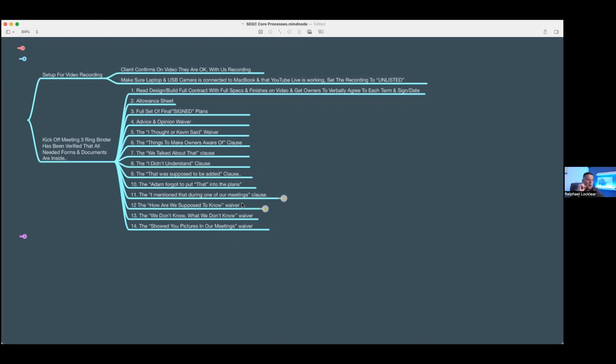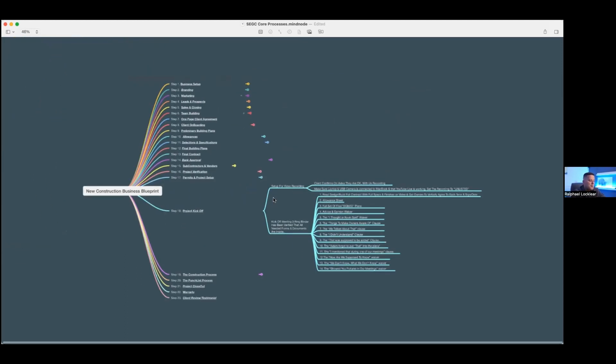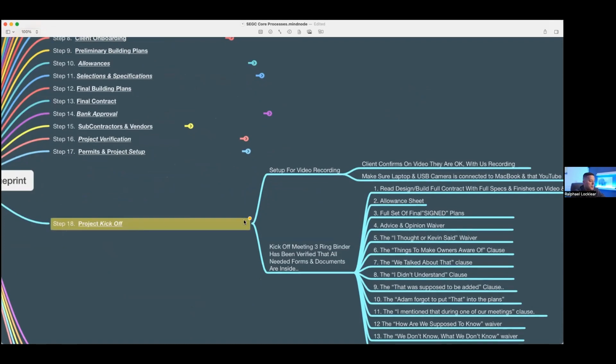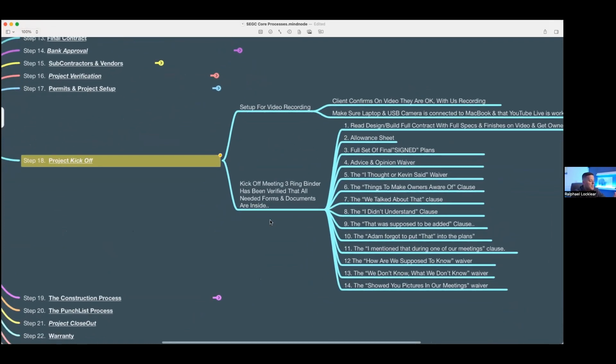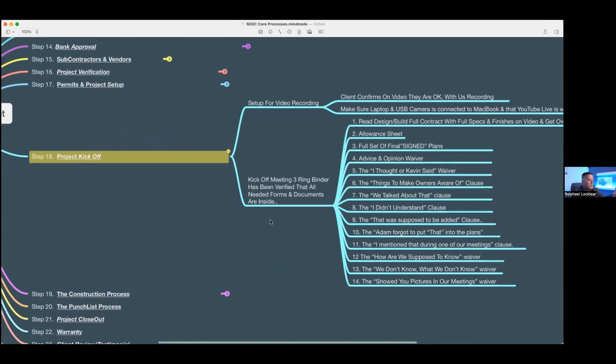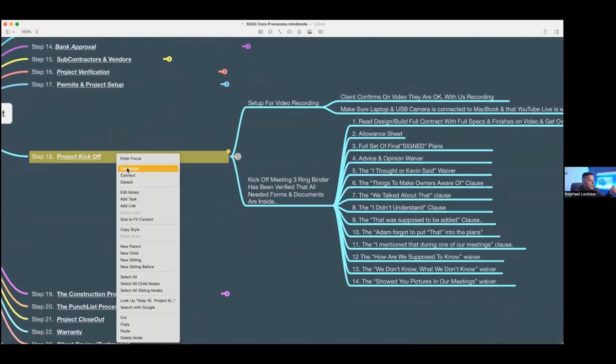If we don't have that pot filler listed above your stove, even though we might have talked about it, and then you ask, is it on there? No, we didn't include that because it wasn't part of the specs. Well, you didn't tell him we wanted that added. See how this works? This is exactly what's supposed to happen. A lot of times you don't take the time to go through this type of stuff. But this is your project kickoff meeting. Before we do anything, we're circling back with the clients again to make sure we're all on the same page. Any questions?